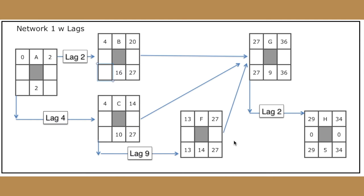So now we're going to have 27 minus 16, so that should be somewhere around 11. And down here, we have a candidate of 17, so 27 minus 10, so that's one possibility there. But we also have 13 minus 9. What's the lower number? That would be 4. So we're going to put the lower number here. I suspect this is going to be one of those cases where we're going to see some slack on the finish time, but not on the start time. So we're going to put 4 here. That's where a lot of students get tripped up. It's because we have to consider these two candidates, because there's a relationship here internally within this task to the start, and what the late start is going to be. But there's also this relationship here we have to consider.